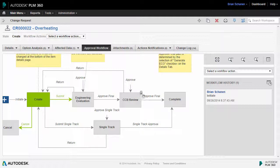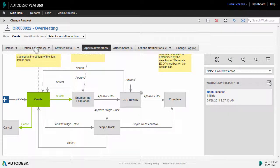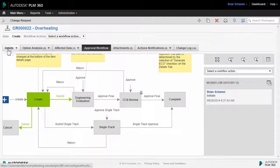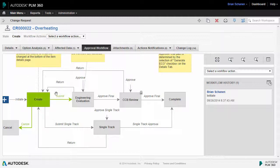Other things that we see in here, when you look at a workflow and you see a lock state. Lock state means that when it gets under here, this is the change control board review, it will effectively lock down the record. So people cannot go in and make changes while others are logging in, weighing in and making a decision as to whether to proceed or not with this change request.